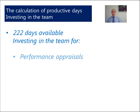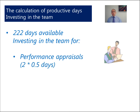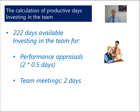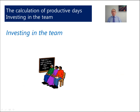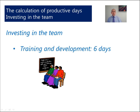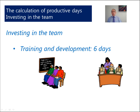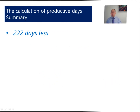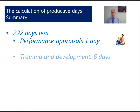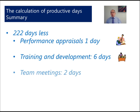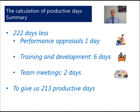Now, we do invest in our team. We will want to sit with them and give them a performance appraisal — every 6 months, we sit down for half a day and look at how well the individual is performing. It is also important to bring the team together for team meetings, and in this example we will assume one every 6 months. As we work in a knowledge economy, we need to train our team, so we will put down 6 days worth of training each year. To summarise: we had 222 days, took off 1 day for performance appraisals, allowed 6 days for training, and had 2 team meetings each year each of 1 day. That leaves us a balance of 213 productive days.